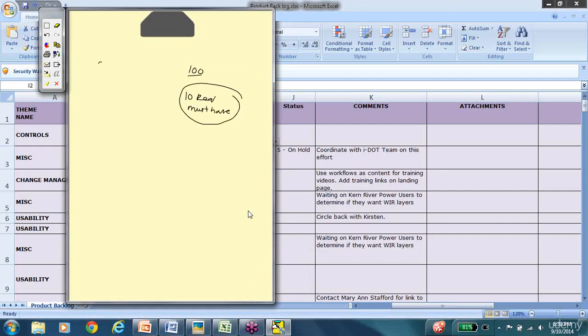So what I would now do is I would start a sprint. Sprint in simple words is a cycle, and in this sprint I would only have these 10 prioritized requirements as my scope. And who decides that these are prioritized? These priorities are set by the Scrum team, which includes all the team members in addition to the business owner or the client. So no matter what kind of decisions we make, since the client is involved, they are going to validate whether or not the requirements that we picked for a particular sprint to go out currently are in line with their business requirements or not.